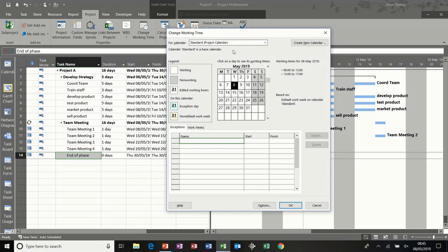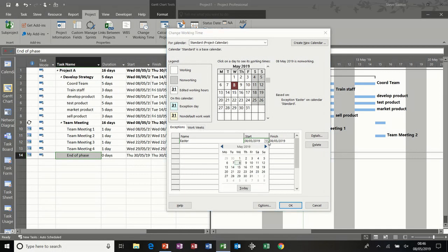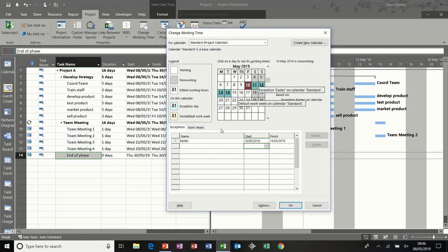So what you put in the project calendar are things like holiday shutdowns, factory shutdowns, bank holidays, exceptions, and things like that. So if I put, for example, Easter, we've had Easter, but let's just say pretend it hasn't happened. So let's say Easter is there, Good Friday, so that there is now shaded out as a non-working time. So that would cascade through everybody else's projects. If you had somebody working over Easter, you would edit their project to allow them to work.